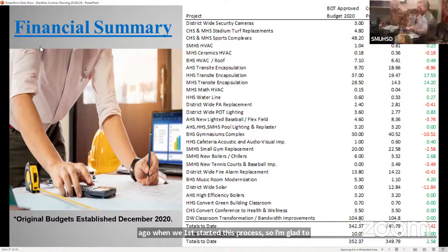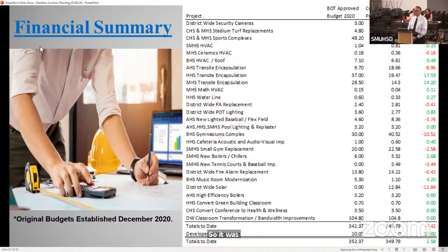No, absolutely. And then just a practical question. Why is Aragon costing so much, or the deficit? What was the unanticipated problem there? It was definitely early assumptions of the amount of scope of work that was going to take for Aragon. After walking the rest of the project and evaluating some other spaces that already had some siding on them, we said, let's look behind here, and we found more transite.